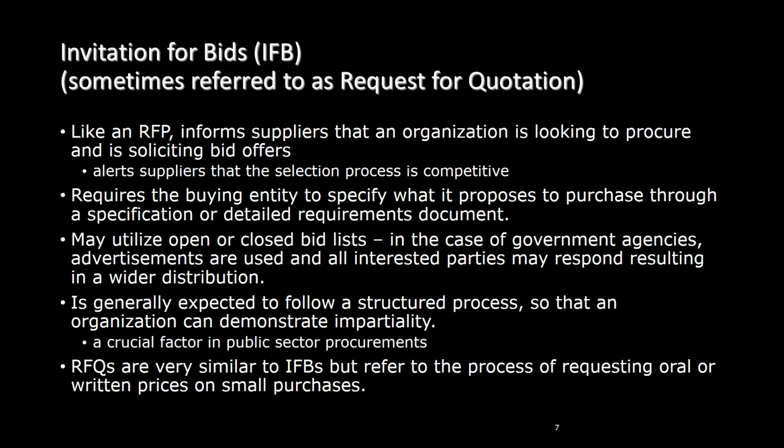This is mostly seen in government sector procurement, where notices are posted in a publication of wide circulation, such as a newspaper daily, or online to invite prospective bidders to submit an offer. Closed bids, on the other hand, refer to a situation where only specific vendors are invited to participate in the IFB. IFBs are generally expected to follow a structured process so that an organization can demonstrate impartiality. This is a crucial factor in public sector procurements.